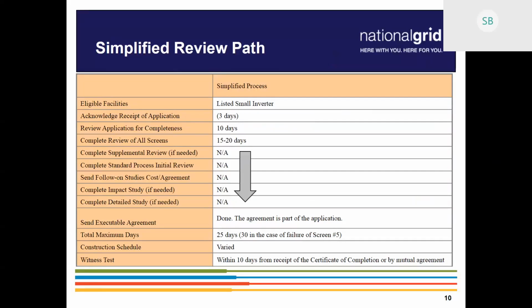You're going to get two emails at that point. Assuming the completion document is all there, we're going to go ahead and order the meters. And then once the meters are set, you'll get two emails. You're going to get authority to interconnect when the net meter is set, and the generation meter set email. That generation meter set email is the one you're going to want to go back to Clear Result with to get the final SOQ for the Mass Smart incentive.